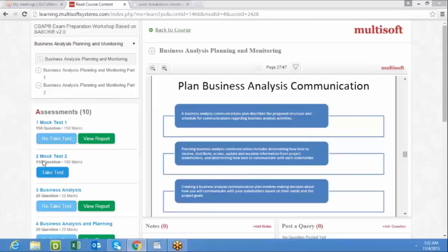I'm asking you such practical scenarios, that okay, we know the stakeholders, but how do we identify key stakeholders? That is the practical approach you were telling me. Who will be impacted? Now, if there are 500 people, you would be assessing their power, their influence, and their interest in your project.